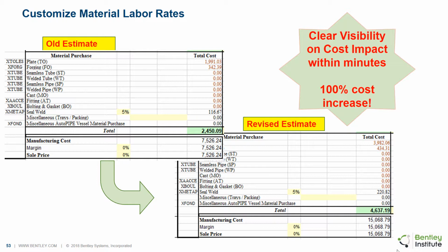If the user is working on a large project with several equipment to run estimates, then it is not practical to change the labor rates and material rates for so many tasks and materials. It would be time consuming and prone to errors. Instead, the easiest approach would be to perform a global rate configuration and save those as separate configuration files and apply the appropriate configuration files. In fact, an evaluation on the most cost-effective solution by a thorough analysis of material and labor cost options can be performed, a topic that we will cover next.